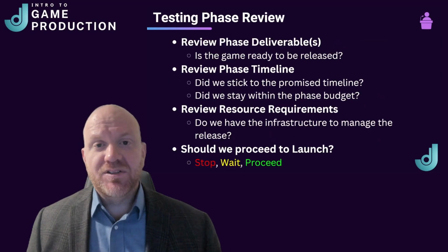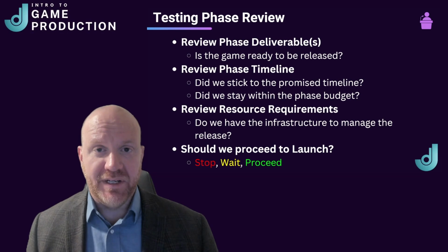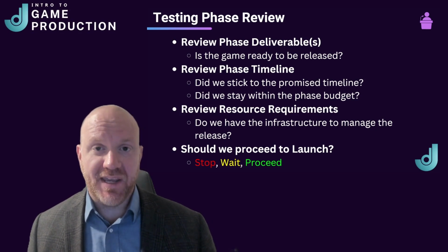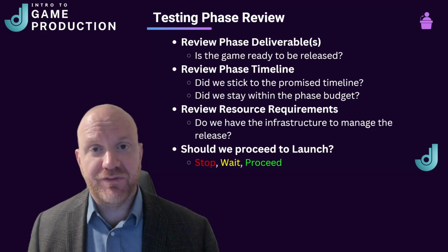So when the testing phase is complete, you'll want to host the testing phase review meeting. And like the previous phases, a majority of the time during this review meeting is going to be spent reviewing the deliverables. And the question you should be asking yourself is, are we ready to launch the game? When reviewing the phase timeline, you're going to want to ask if we stuck to the timeline and if we stuck to the project budget for the timeline.